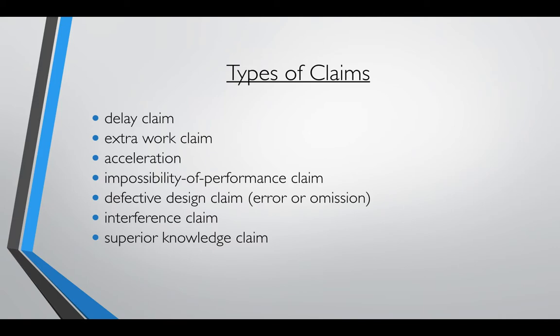A superior knowledge claim is when the owner knows something that you did not know of, whether in the bidding process or later on once construction is underway, and they're holding that information away from the contractor. The contractor can come back and say, "Hey, listen, you should have brought this up. Now this cost me so much more time and so much more money," and they can submit a superior knowledge claim. So there are many different types of claims out there.